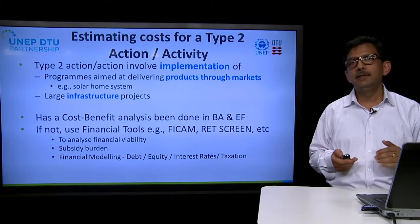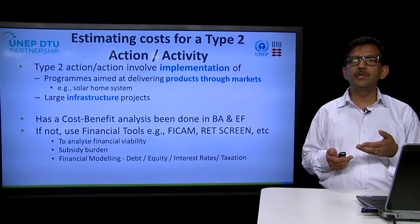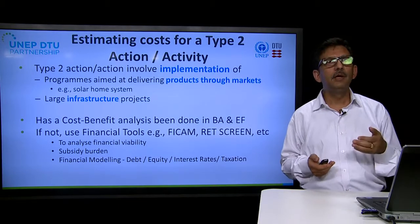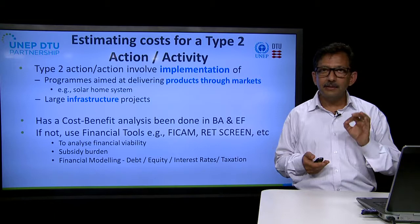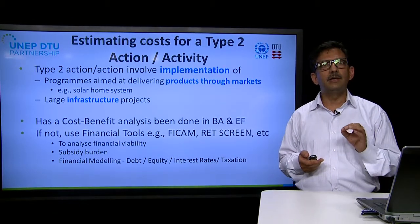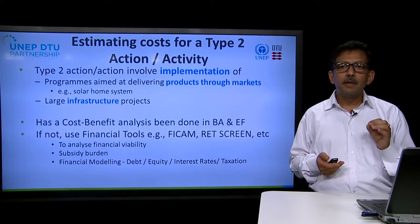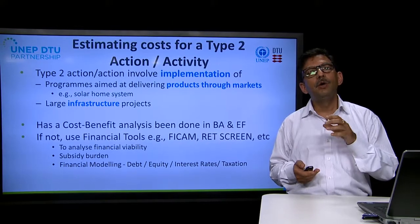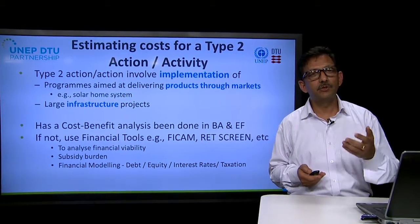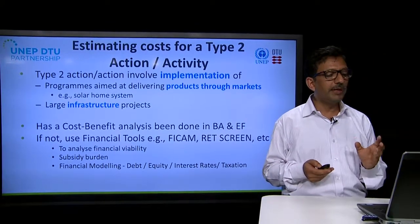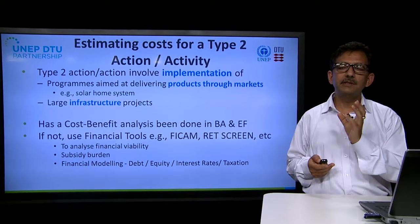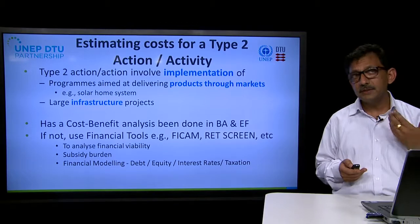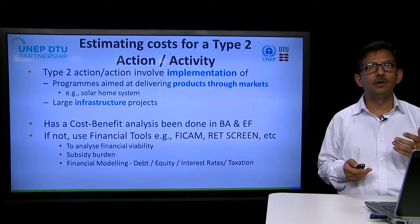However, if cost-benefit analysis has not been done, we can make use of certain financial tools. Within the project there is the FECAM model, available on the project website, which can be used. There are also other tools like RETScreen and Homer which can be used for this kind of financial analysis. The reason we do this is to understand the financial viability, analyze the burden of subsidies or incentives being provided to consumers, and do financial modeling to understand the debt-equity structuring of the project and the impact of different government policies such as taxation or changes in interest rates.